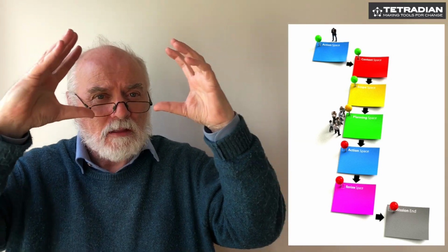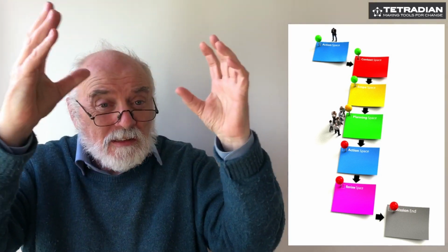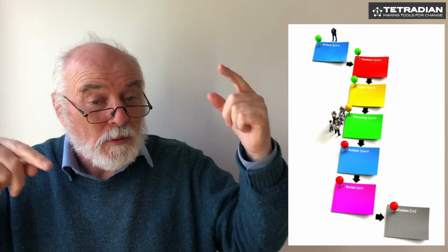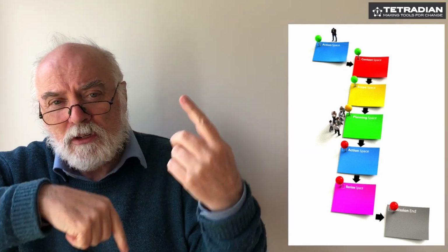In the plan, the next stage down, we're going to build instructions, we're going to look at the setup, we're going to look at the start and end conditions. That's the information we want. We need to identify and resolve as many uncertainties as we can before we get into the action. A colleague described this as a kind of bubble metaphor. We have to shrink the bubble in order to get through. And the skill level determines how big that space is going to be. The more skill someone has, the more uncertainty they're going to be able to deal with. But a raw trainee or a computer system is not going to be able to deal with much uncertainty at all. We've got to resolve any uncertainty during that plan period, which we will often do by looping through iteratively to resolve as many uncertainties as we can before we get into the action.